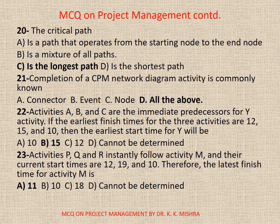Question 22: Activities A, B and C are the immediate predecessors for activity Y. If the earliest finish times for the three activities are 12, 15 and 10 respectively, then the earliest start time for Y will be — Options: A. 10; B. 15; C. 12; D. Cannot be determined. Correct option is B: 15. Because an activity can be started only when all its predecessors have been completed.